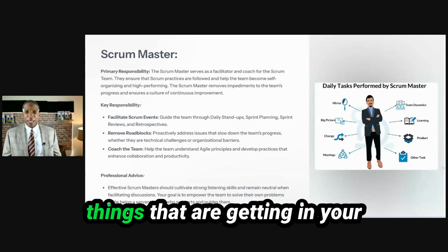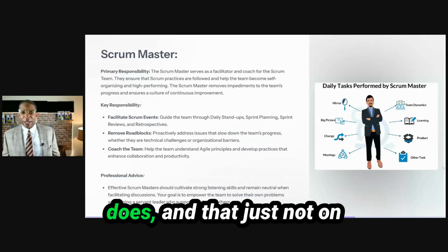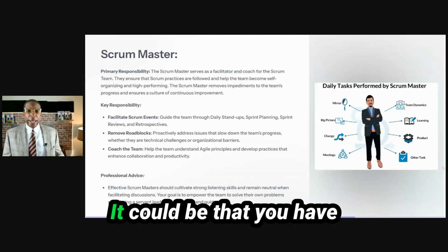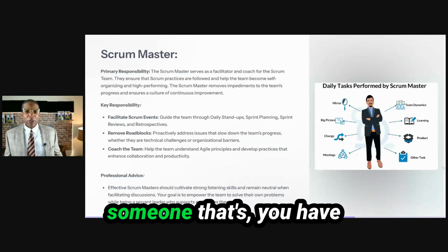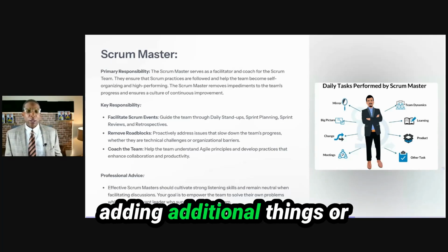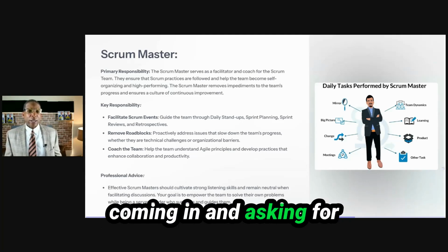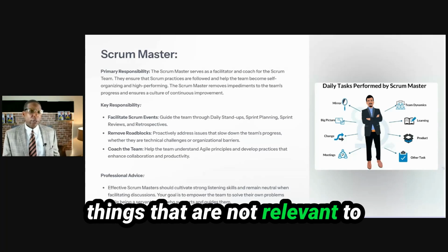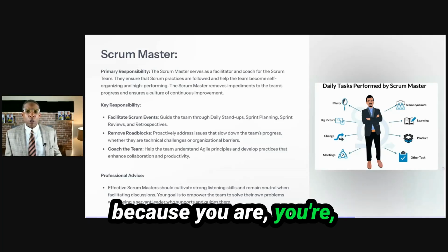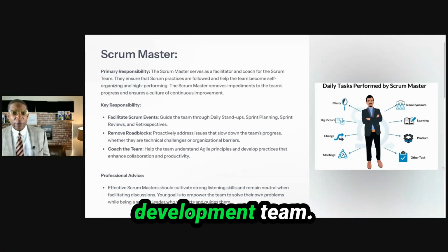Impediments are things that are getting in the way of you doing what you need to do. And not just, like, somebody owes you something they're supposed to give. It could be that you have a customer asking you for additional things, or people outside of the team coming in and asking for things that are not relevant to what you guys are building. That's an impediment because you're taking away time from that actual development team.